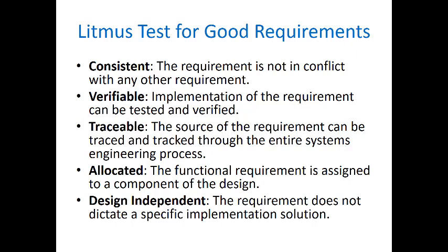Another very important feature that we have talked about in class many times is that we want our requirements to be design independent. So you should not say anything about how you are going to make that requirement happen as you try to document your requirements. All I want to say is that I want 95% availability of the bikes when a person or a customer gets to the station.